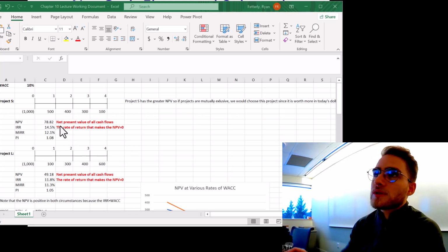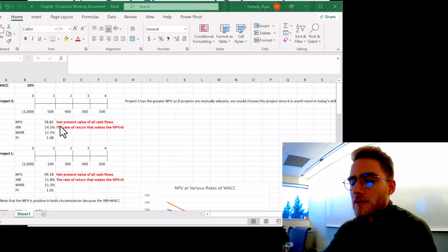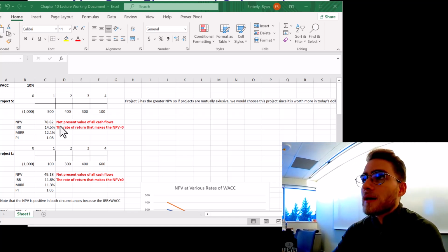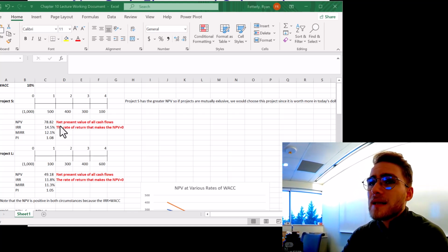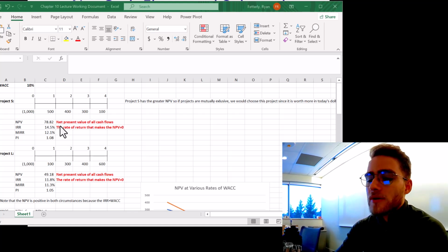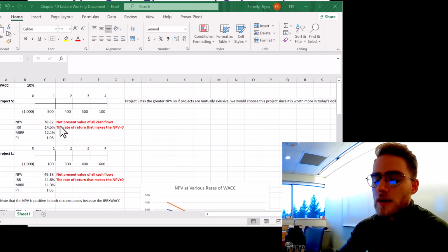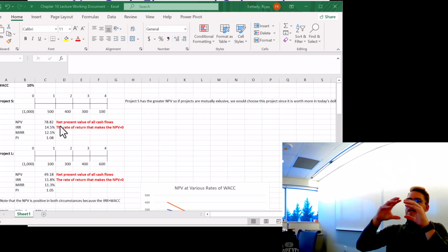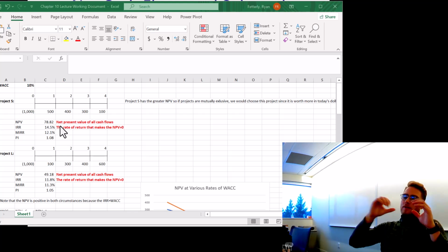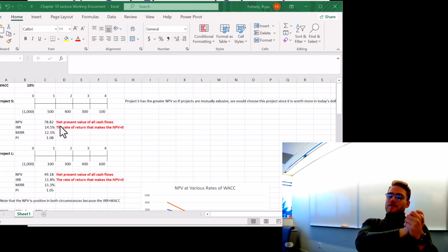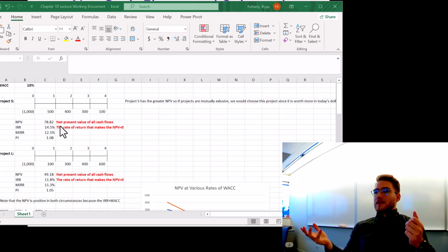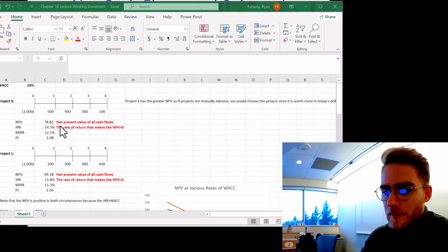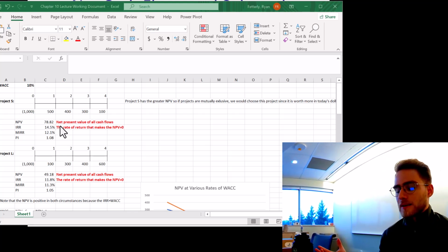So first we're going to do what's called a net present value. If you remember back to maybe the first part of this course, when we did personal finance, you think back to the time value of money and present valuing amounts, right? So when we do a net present value calculation, all we're doing is taking all those future cash flows and present valuing them to today's value at whatever the applicable discount rate is, right? So in chapter 9, we talked about the weighted average cost of capital, the average cost of financing a project.